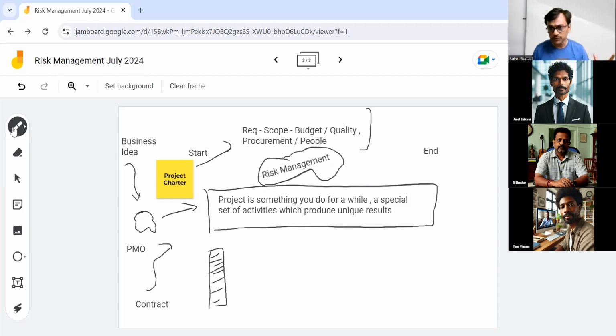And in order to take care of those uncertainties, we have taken an iterative approach. We can say, okay, we will take two weeks or a particular duration iteration, and we will take a portion of our product backlog in the iteration, and we will do it. And based on the feedback, we will improve our work.